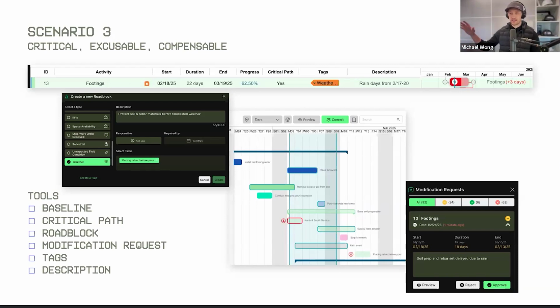Like you're putting roadblocks on the plans that you have that are multiple weeks from now, because your support team who is helping this plan become reality, the more information they have as early as possible, the better the responses will be, the better the drawings will be, the better the details will be, and the faster I can get this submittal done correctly. If we're sending stuff to that support team, those PMs, those owner's reps, those people that are answering these questions for you, the day before or the day of, you can't really constrain or blame them for not getting you answers fast enough, because trying to get a hold of an architect or an engineer or get a drawing proof most of the time doesn't happen overnight, right? It takes days, even weeks sometimes.